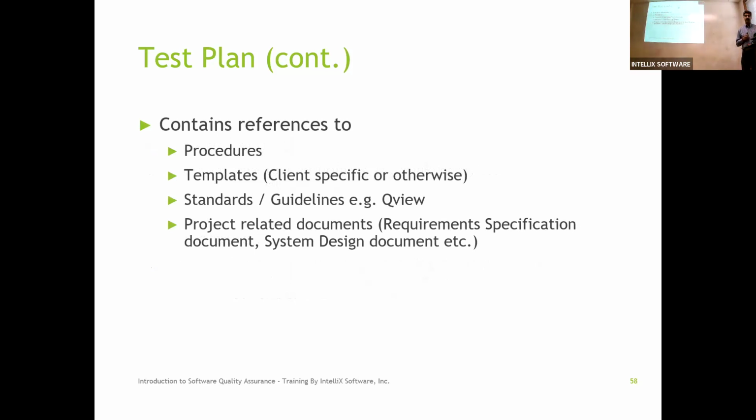Requirements document. Because if they give you a requirements document, you build a test plan, and if they change that requirements document, most likely your test plan needs to be updated. It's no longer valid, right? Because something was changed. So when you put the test plan together, you identify, hey, this test plan coordinates and refers to this version of the requirements document of how it needs to be tested.